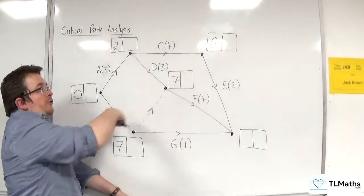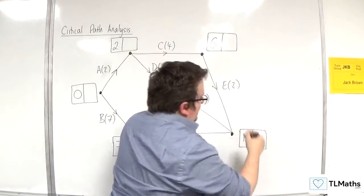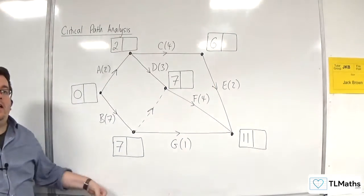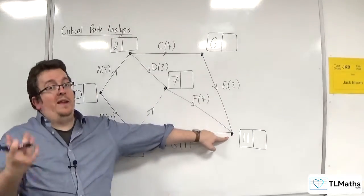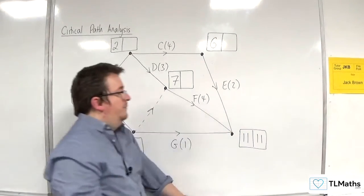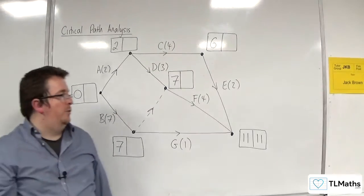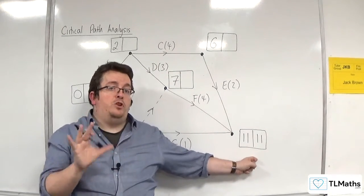But as we saw with this box, we chose the larger. So this should be 11. So that's the earliest I can reach that node. So the late event time is the same. So when you get to your final node, the early event time should be the same.